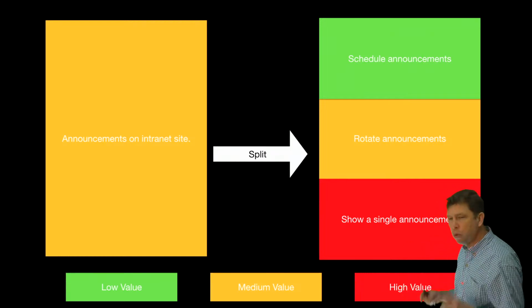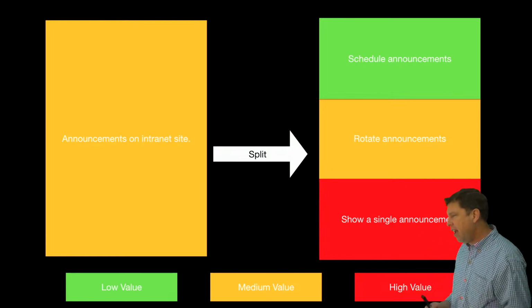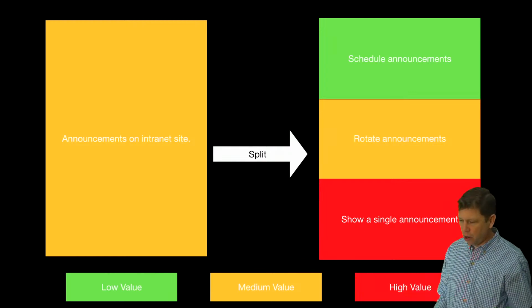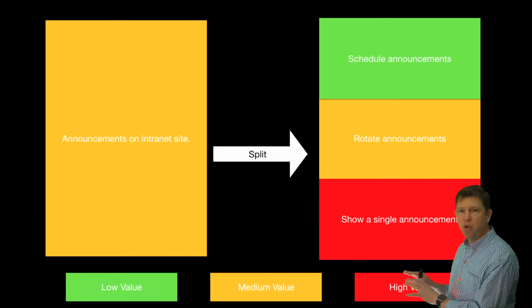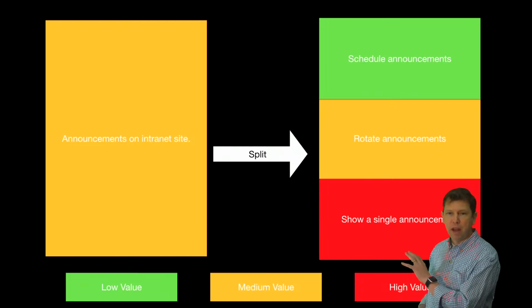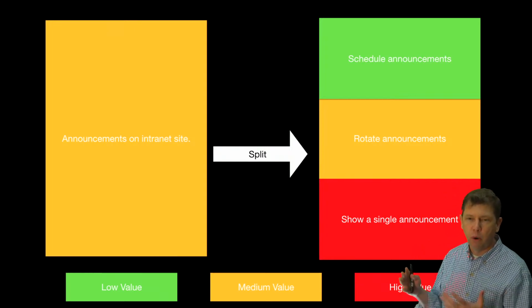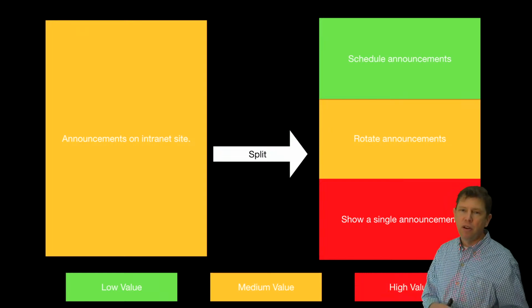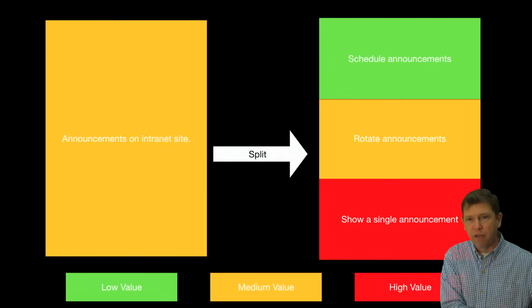And so then I said, okay, so what's the next most valuable thing? Is it rotating the announcements? And what he said, and this was a beautiful example of splitting stories at work, he said, oh, no, we don't want to do any of those other things now. This worked so well, and by splitting it up like this, you gave us 90% of what was valuable, or 95% of what was valuable in this story. The other stuff at this point in time is low enough value that we would rather you do the same magic on this other story we have over here.